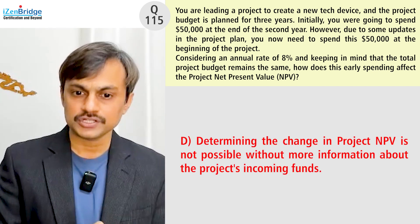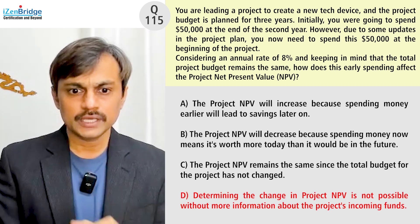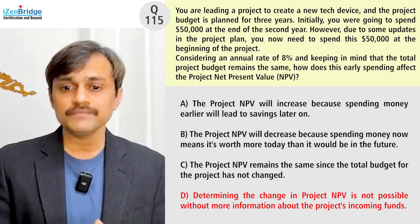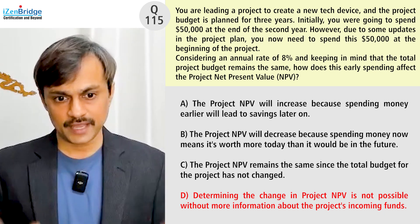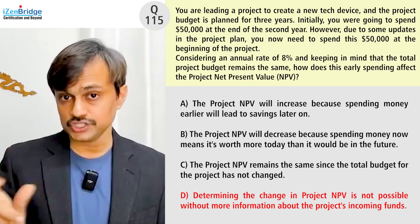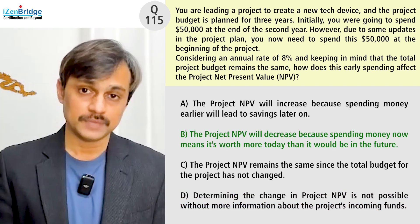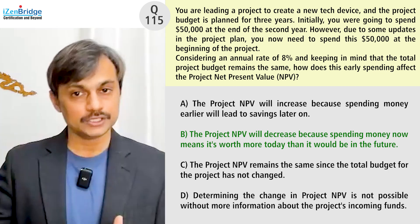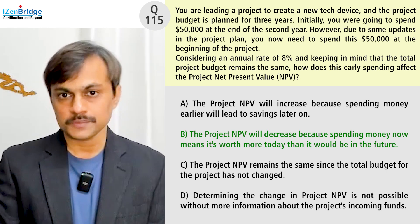Option D: determining the change in project NPV is not possible without more information about the project's incoming funds. That's true — if someone asks me to calculate the net present value, I can't because I don't know the incomes. But I know the impact: if other parameters remain unchanged and this one is changing, it will decrease my NPV. So though option D is true, option B is more appropriate because it maps directly to the impact of spending the money now versus after two years on the NPV.